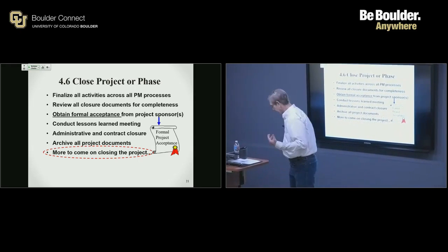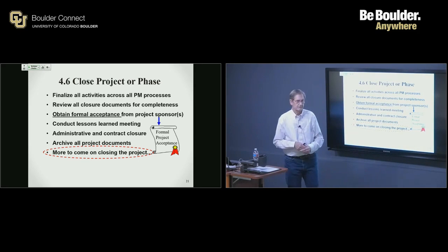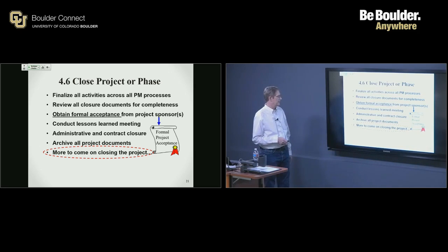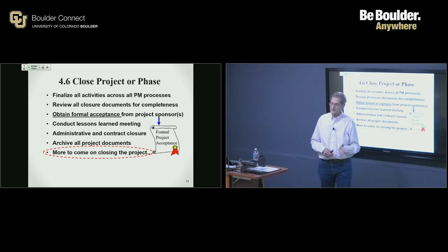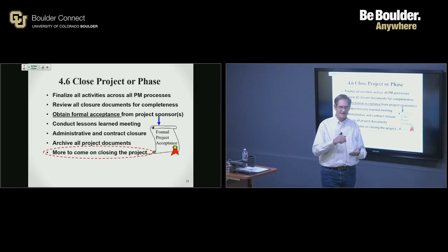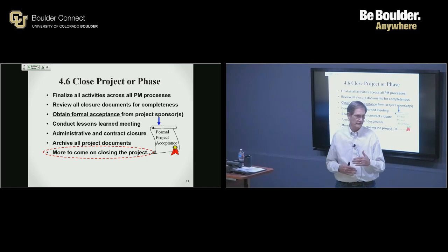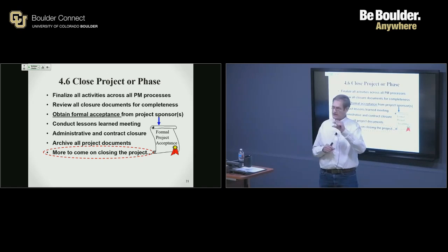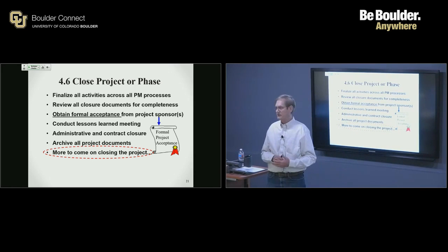And I would submit to you that closing a project is, and often should be considered, a project in itself. This is that closing process group, many things that need to be considered. And at the end of the day, formal acceptance is what we hope. Are all of the deliverables complete? And get the customer kind of nodding their head in the right direction. And then you get that sign-off. And in IBM, we actually had a project acceptance form. It was 1 page, and we would summarize the deliverables that were met, the target dates, and then we would ask the customer to sign the acceptance form that says the project is hereby complete.